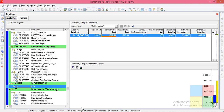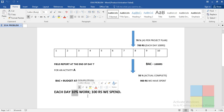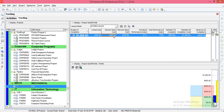Earned Value Cost (EVC) is the planned cost for the work actually completed. For the 50% of work done, as per the plan we should have spent 100 rupees per day. For 50% of work we need five days of work — each day we finish 10% of work, so each day we spend 100 rupees. For five days that is 500 rupees — that is the Earned Value Cost.